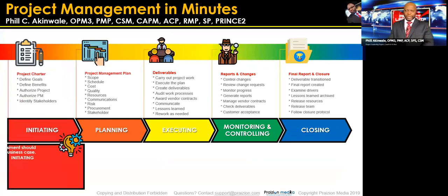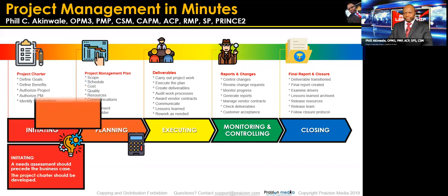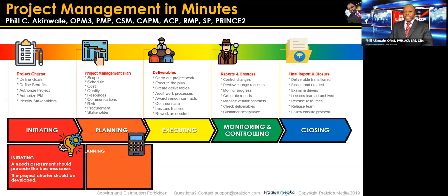Again, from initiating, you're going to get out a project charter, but this should be preceded by a business case. A business case is a document that makes a case for the project. It gives us a clear idea of why the project should be authorized. The output of planning is something we call a project management plan.